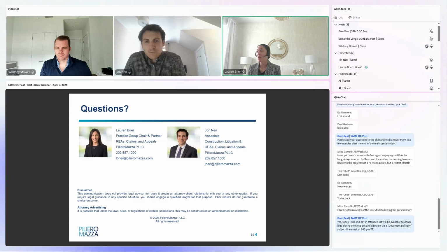What can you do then? You actually have to file a claim for those delays to properly raise those as defenses at the Board of Contract Appeals. So procedurally, it's a bit complicated, but we do it for clients all the time where we're appealing the notice for termination for default. We sometimes will seek a stay of that process to allow us to then file claims arguing delay so that we can then raise those defenses to the termination for default. Again, I know that sounds very complicated, and it is, but it's really the only way that you can get your defenses at the board or at the Court of Federal Claims to process appropriately.